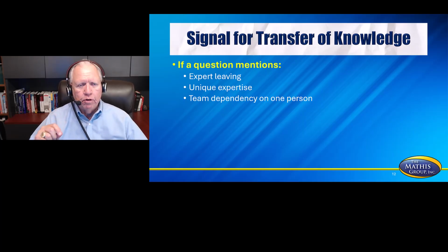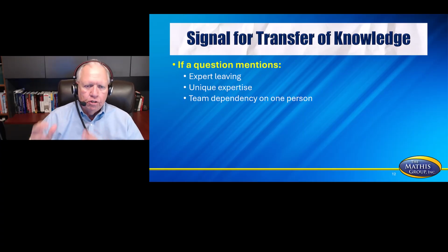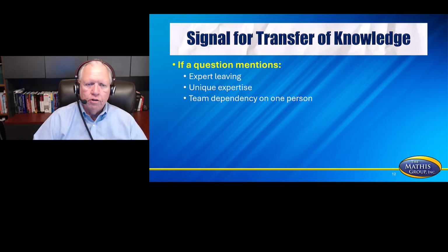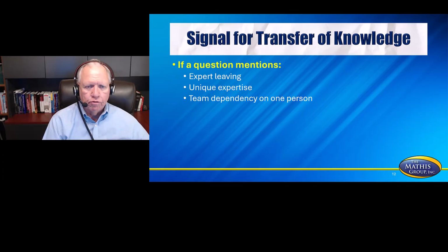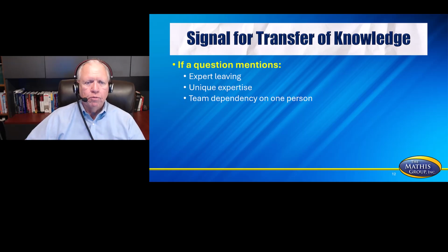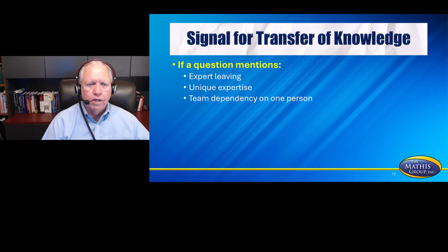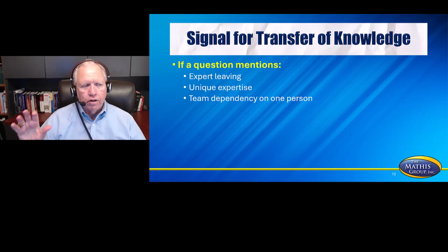One other point before we move on. Transfer of knowledge in your test questions will also go from the team to the customer or to operations. Your team knows a lot about the project, so part of transfer of knowledge and training, you will see on your test as well, where you might have to spend some time training your counterpart in operations or with the customer so that they understand all about the project, how to run the project once it's finished, and be able to use the software or tool that you're putting into place for them. So do not hesitate to think that that's not transfer of knowledge as well.